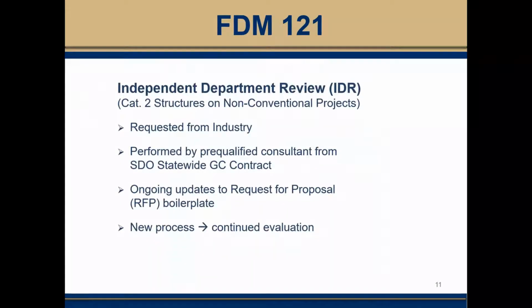The IDR, as mentioned, will be performed on structures on non-conventional projects. This new process was requested from our partners ACEC and FTBA in industry. The IDR will be performed for each design build project by a Rule 14-75 of the Florida Administrative Code pre-qualified consultant from SDO's statewide GC contract. We are currently implementing the new process in construction's RFP boilerplate, and please note that this is a new process and will continue to be evaluated based on lessons learned from each project as we move forward.